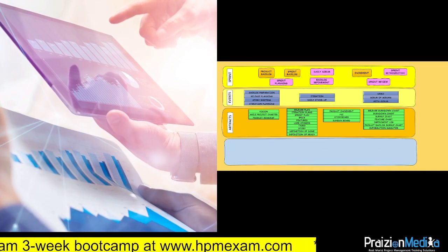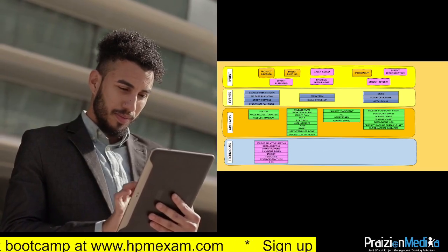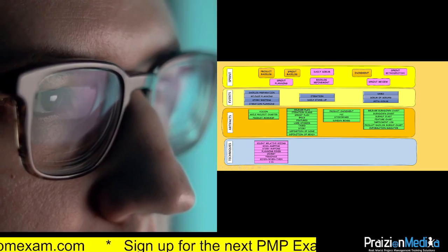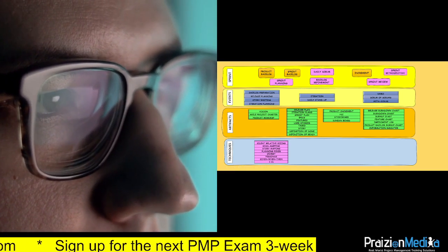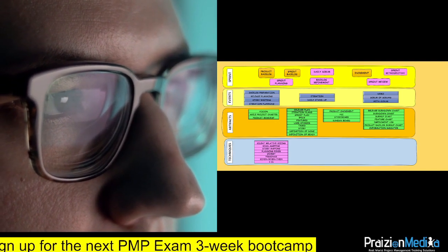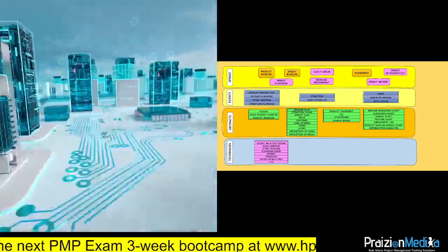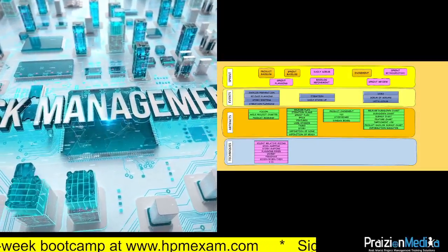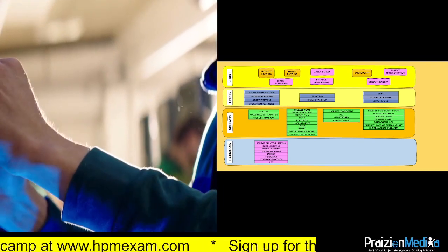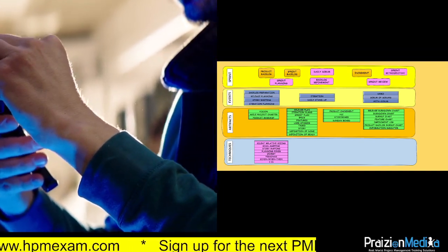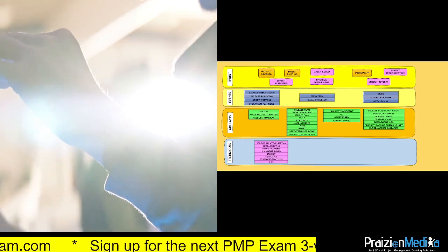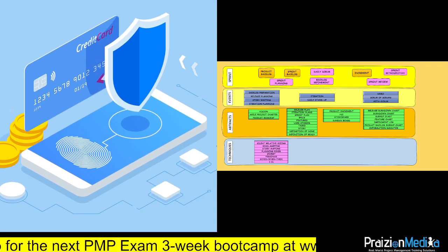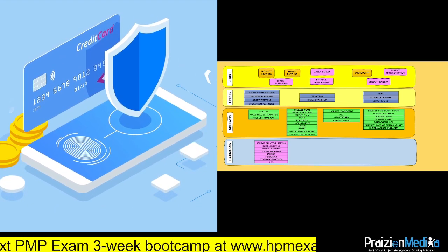Now let's move into the techniques. Under techniques, you have certain techniques that are quite popular in the Agile space. When you are estimating in an Agile world, we don't estimate the way we do in predictive. We use the concept of story points, and to understand story points, we use silent relative sizing. We could use the concept of planning poker. We could use the concept of t-shirt sizing, animal sizing, and things such as that.